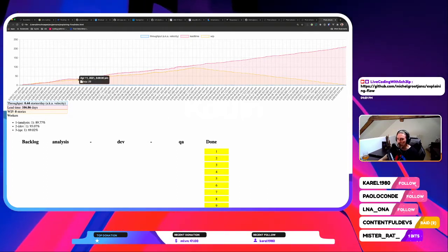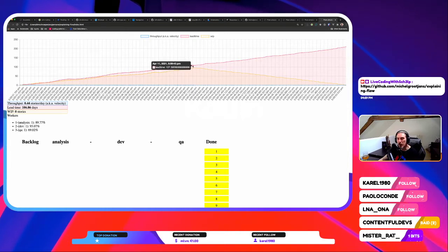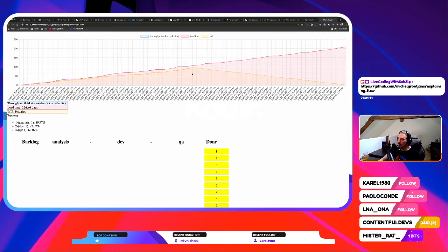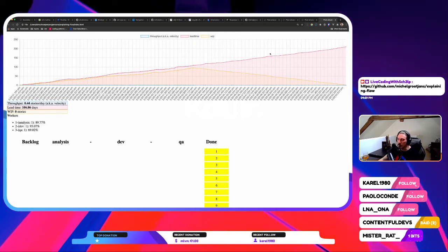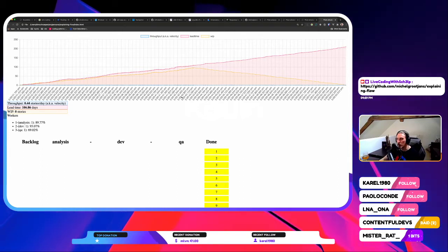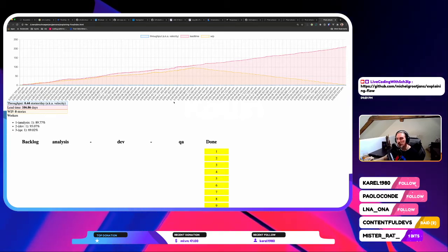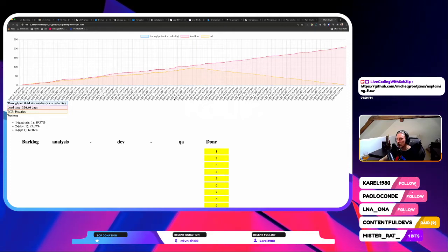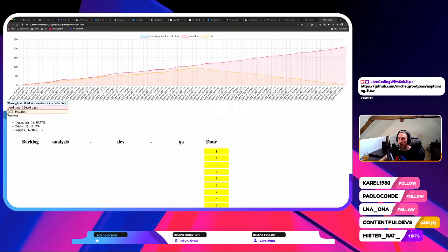But you can see that it's a very dangerous thing to keep on increasing work in progress, because as you can see, we've also been increasing our lead time very consistently. And here you can also see that the lagging effect has a very serious impact. The longer you keep on piling up work in progress, the longer it will take for the lead time to increase as well. So the more work in progress you'll have, the later you'll learn that your lead time has increased quite exhaustively. This also reflects in the tester being less efficient at their job than before.